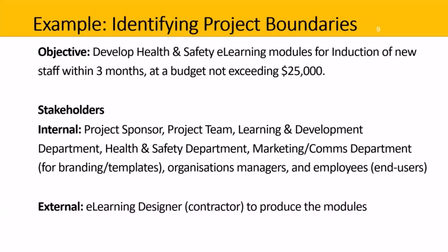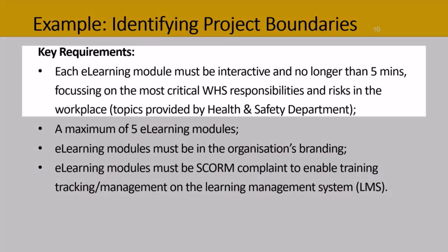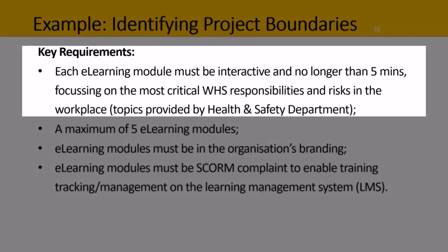Now, thinking through these stakeholders leads me to the next part. They've helped me to come up with some project boundaries, starting with key requirements. So when I think through these stakeholders, and perhaps I've had some conversations, these e-learning modules must be interactive and no longer than 5 minutes. And they have to focus on the most critical workplace health and safety responsibilities and risks in the workplace. And the actual topics are going to be provided by the health and safety department. So you can imagine I probably talked to learning and development and health and safety, and they've helped me understand that these are the requirements.